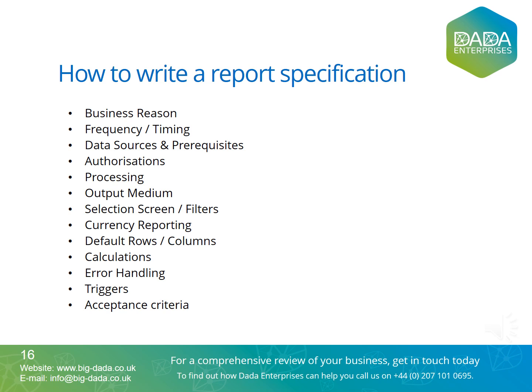How will end users want to slice and dice the data? Will this mean changes to the cost breakdown structure and chart of accounts and organizational structure? Do you need a drill-down functionality from the top-level portfolio overview through to the individual projects and all the way to the individual work packages and cost accounts where there's a problem?